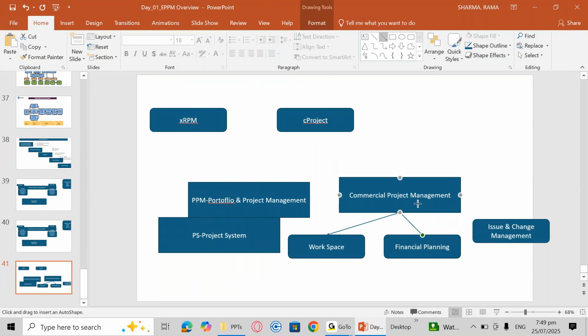Okay, so when you reach the execution phase of your project, you may need to add some plan values, plan cost, or let's say you may be asked to change the project timelines. Okay, because of that the cost is going to be impacted. So in that case, change management will help us to track this information and to take the approval, and further the same plan cost will be added into your already approved cost.